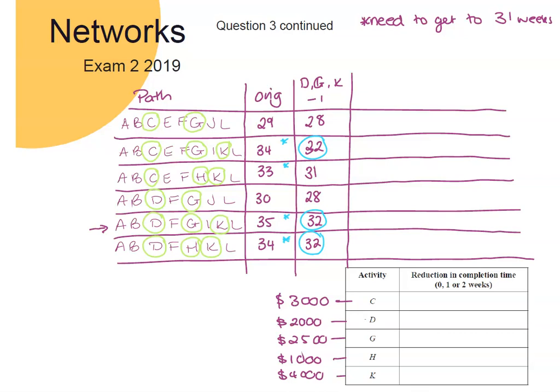Okay, so at the moment, we have spent 2,000 plus another 2,500 plus 4,000. So that is 8,500 cost us so far. Okay, so thinking about what is going to achieve that final little bit. So let's try G by another one more. So let's do G, take off another week.